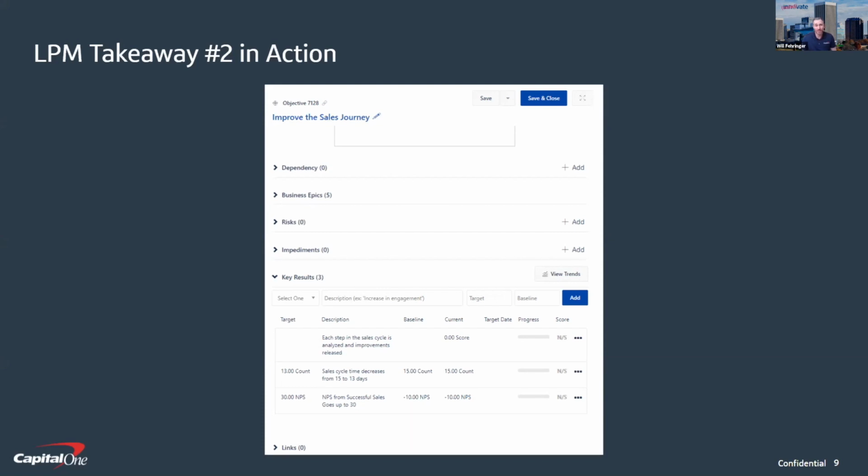Yeah, great question. And the practical answer is that people like to be able to show progress over time. So having that step function makes it easy to show that progress. I will tell you, if you have a binary key result and the leader is asking for an update and it's 0, 0, 0, 0, 0 all the way across, you're going to quickly want to start incrementing that so that you're not getting a million questions all the time about why this hasn't moved. Why is this still 0, and so on and so forth. So that's really the practical reason for it.